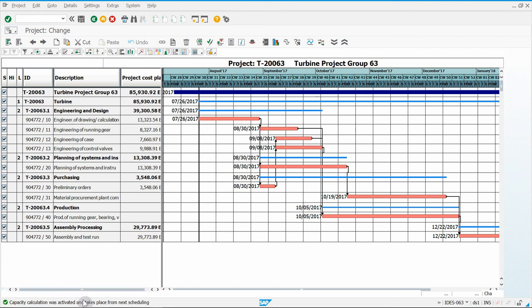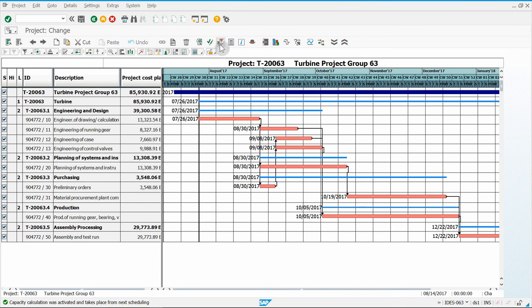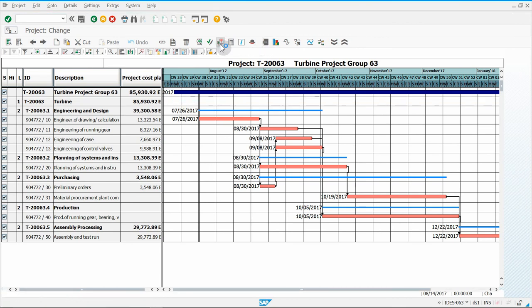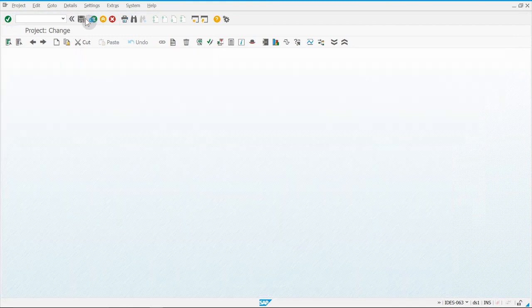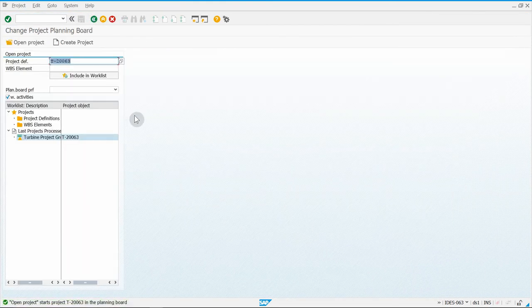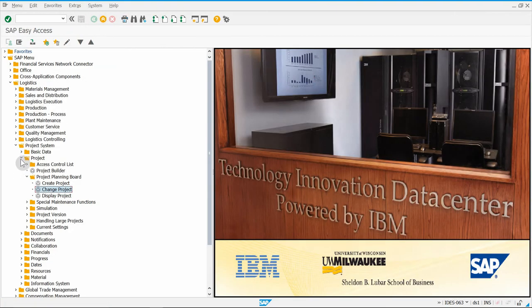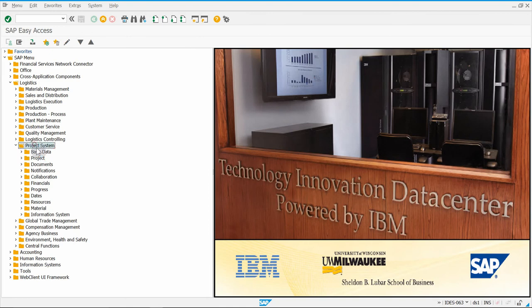It says the capacity calculation was activated and takes place from next scheduling, so we have to reschedule the project. Make sure everything is still selected on the side and click Schedule. You'll see that scheduling has been carried out. At this point, you can save your project. Then back out and close up Project — you should still see Project System.